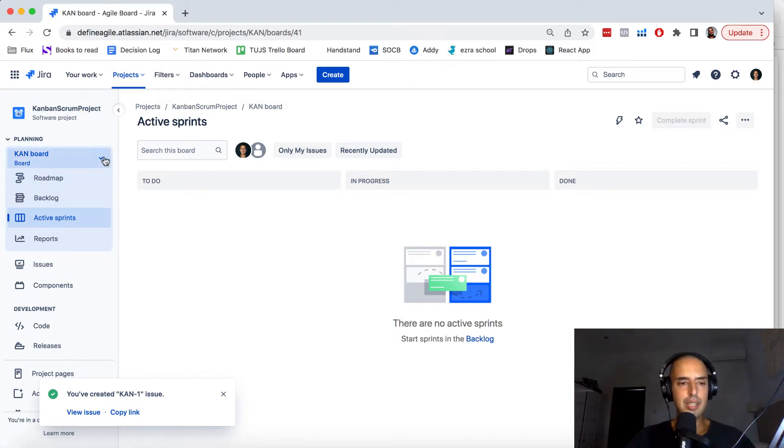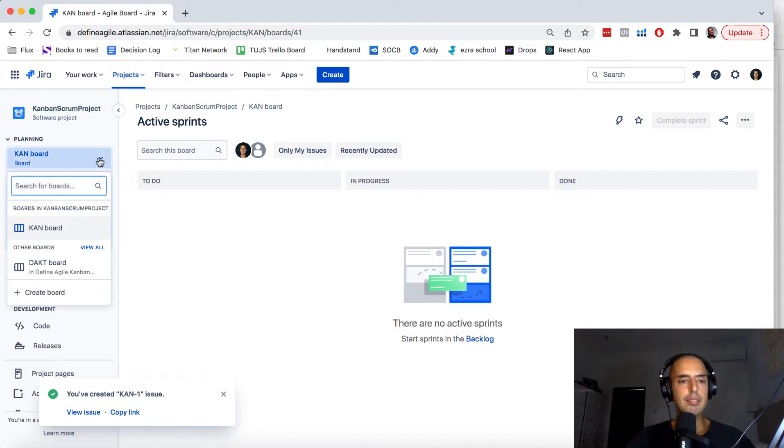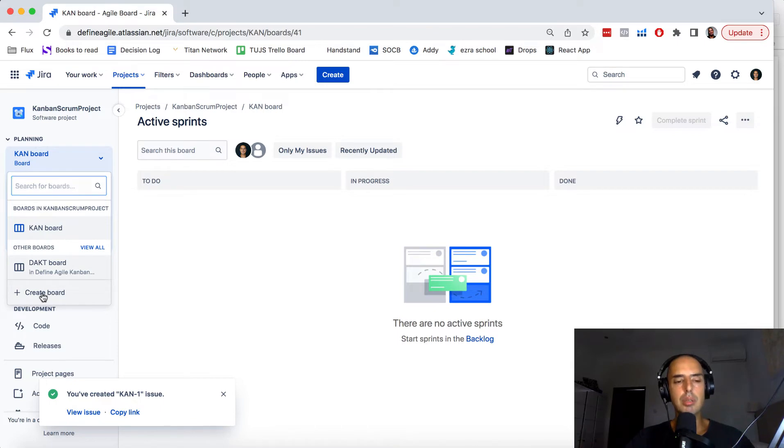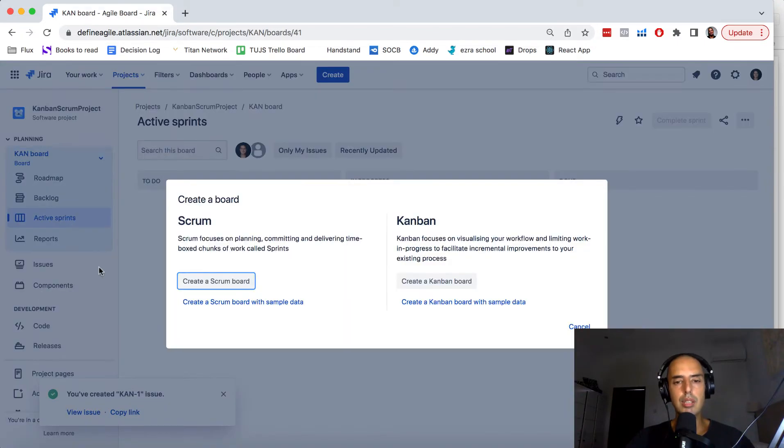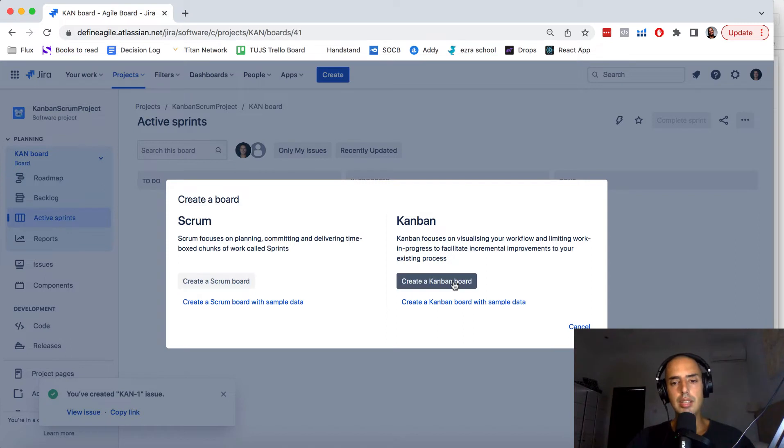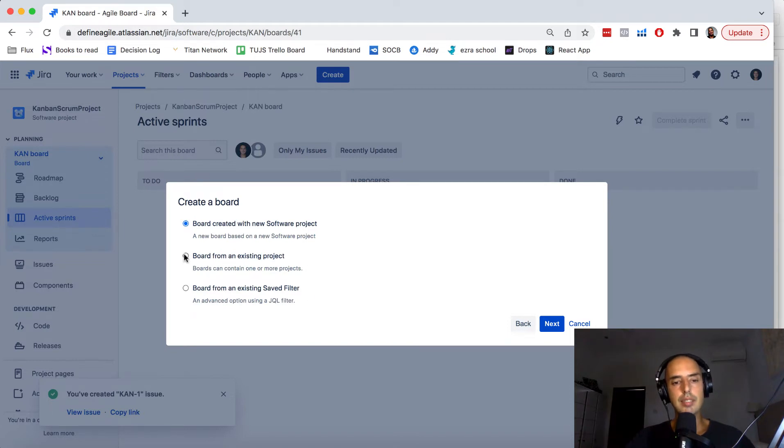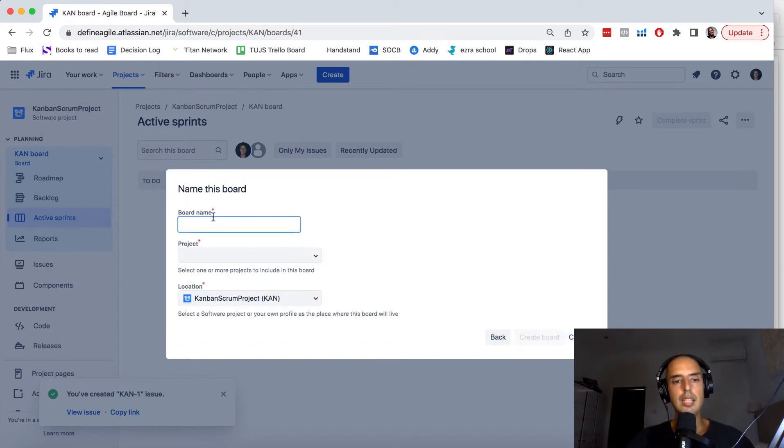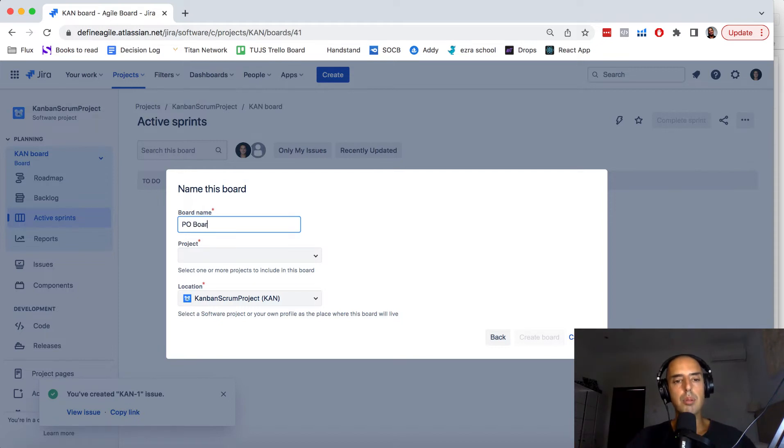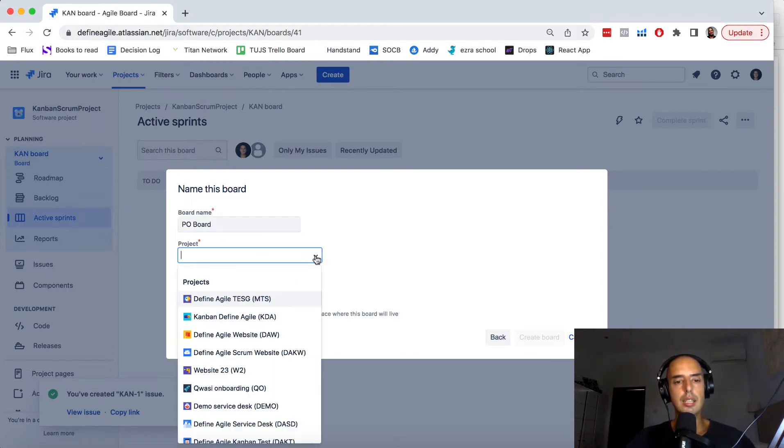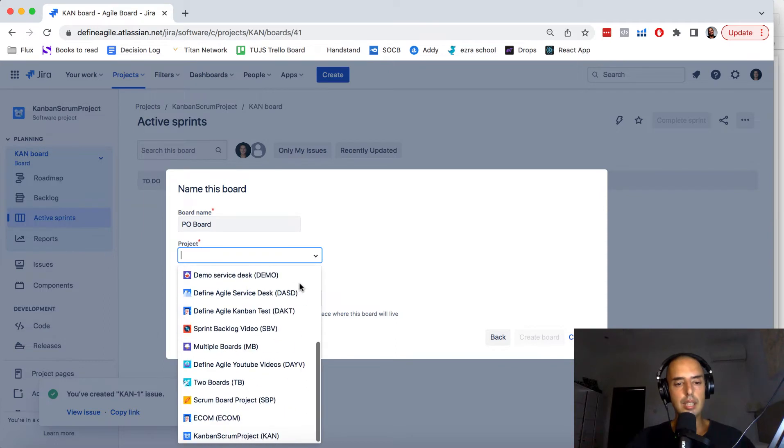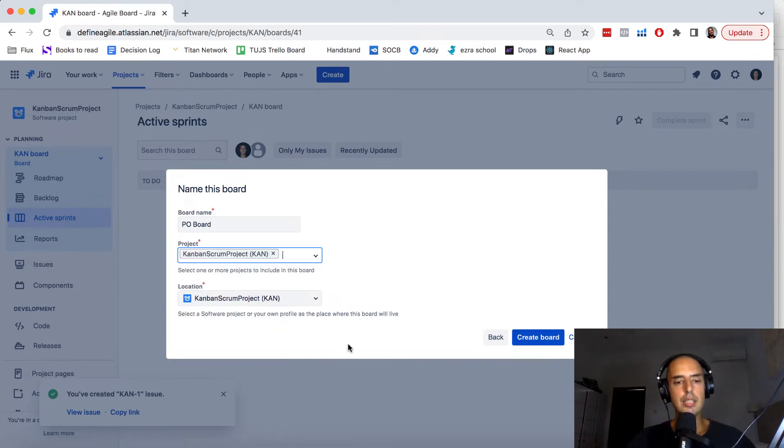So what you need to do is you need to click on the project name board and then you can see the board and it allows you to create a board. So when you click create board it goes to create Scrum or Kanban board. So let's create a Kanban board. Board, create with a new software project, existing, or existing saved filter. I would create from an existing project for this one. Click next. The board name, let's say we have product owner board. The project, let's select the project that we just created. Kanban Scrum test. Location. Create board.